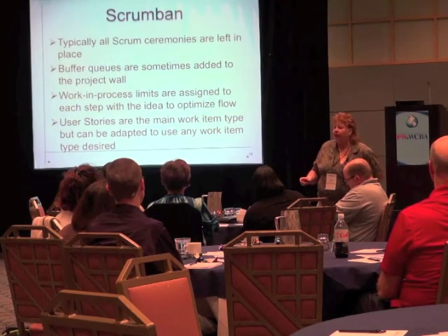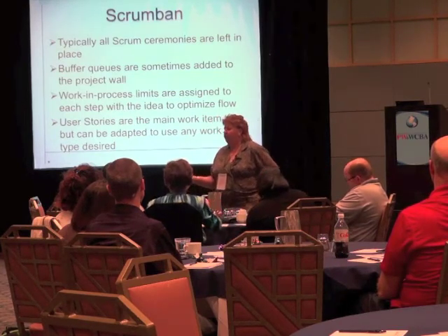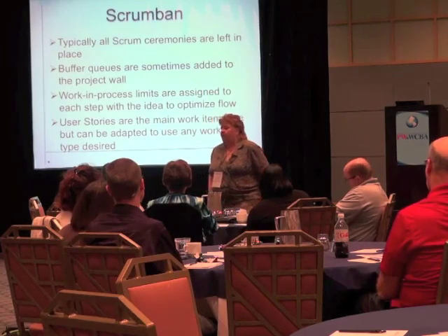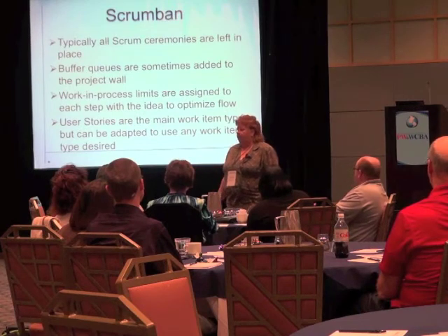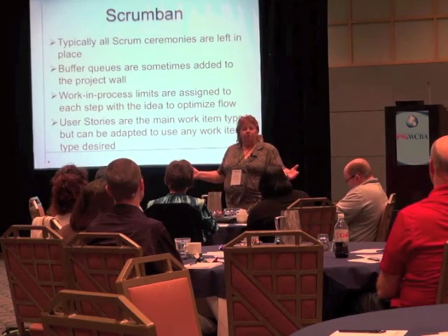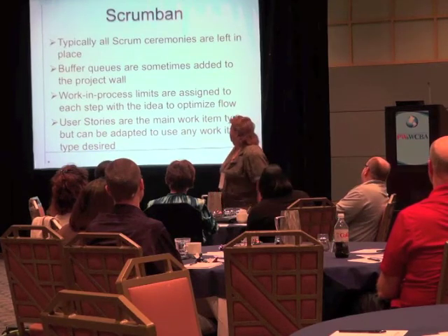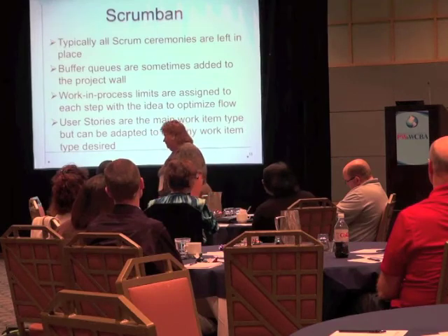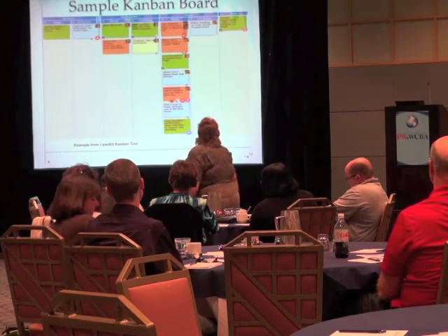And the reason I do that is that you can do 90% of every task and not finish one flipping story. I've seen teams do this. It's also why I don't like to track time. Right? Because people tell you, well, we used up all the time. Well, heck yeah, the clock went around. We used the time. So if you're using user stories, track the flow by the story, not by the tasks beneath it. Here's a sample Kanban board.